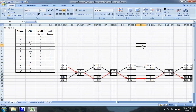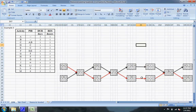That right there is the critical path. It's easy to tell which activities are on the critical path because the early start and the late start are always going to be the same number. You can see that on A, C, E, F, H, J, K, and M — they're all the same numbers. Now that we have the CPM diagram made and the critical path laid out, I'm going to go ahead and convert this into a bar chart.